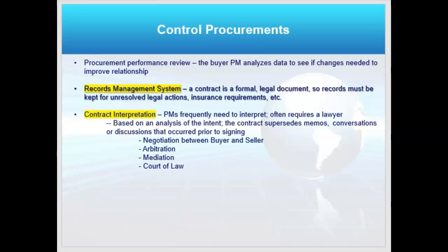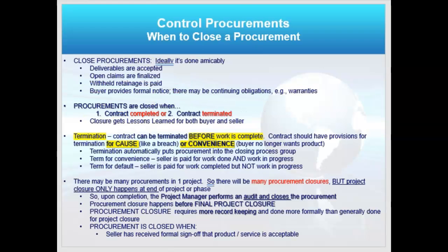I check with legal when I do that. And if you have issues, that's when ADR, first you negotiate between the buyer and seller. If you can't resolve it, arbitration, mediation, or litigation become the next steps. That's all part of alternative dispute resolution.